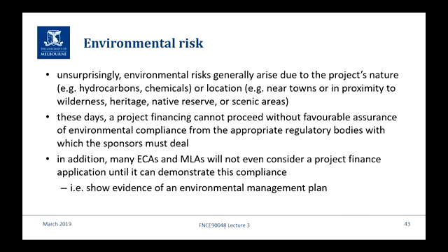But what we see is that when you're starting to look for sources of finance, you say, well, we're going to export equipment so we can go to the ECAs, and we're going into a developing nation so we can go to the multilateral agencies. One of the first things they'll look at before they even consider your project is, let us see your environmental plan. You say, oh, well, we haven't done that yet, we haven't done all our risk analysis. They'll say, don't come to us until you finish that bit. So it's a focus of those bodies, in particular the MLAs, because they have slightly different mandates.